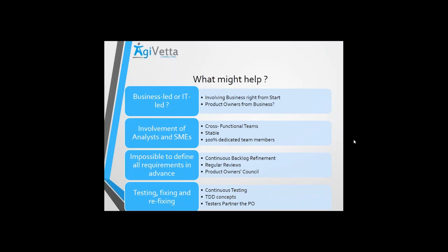Next comes continuous testing. Now, typically in a BI project, testing is relegated to the end. Oh, we'll create the data warehouse and we are waiting for the data set. We don't have the production data available. So this is something that the stakeholders, the business, as well as the senior guys need to work together on. You need to think about continuous testing, continuous regression.